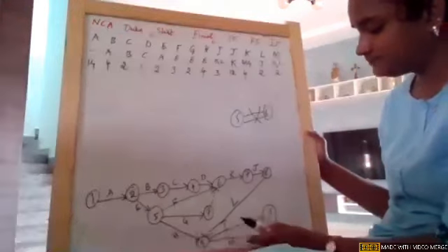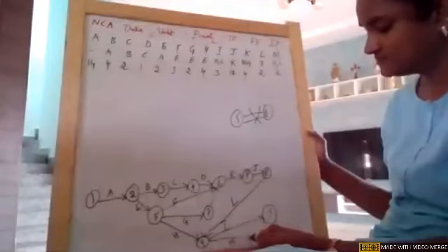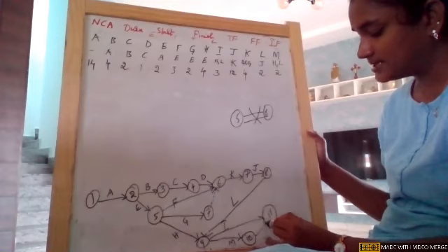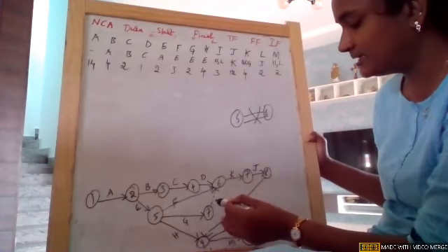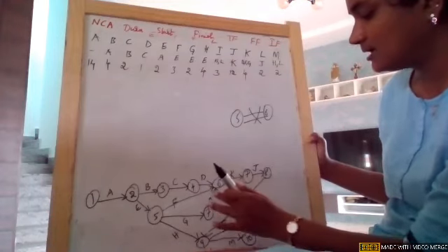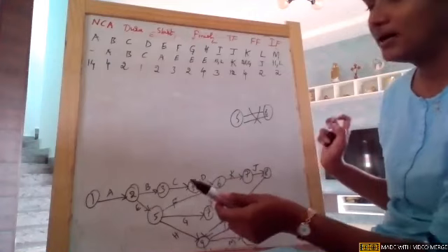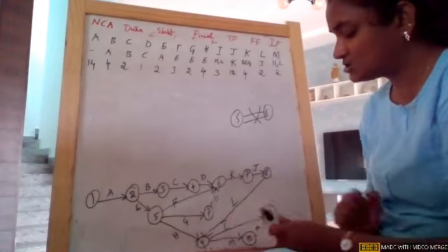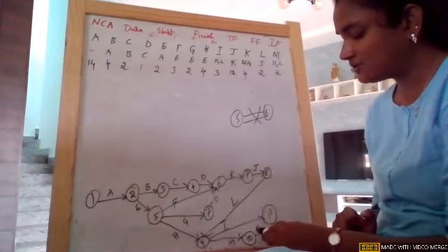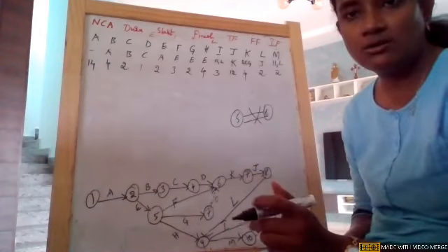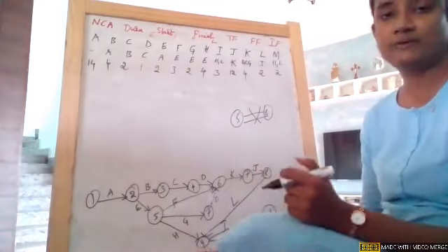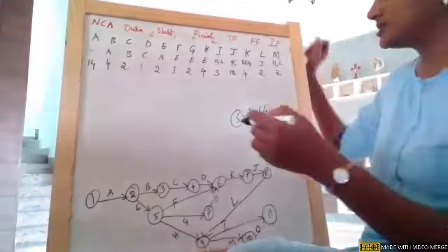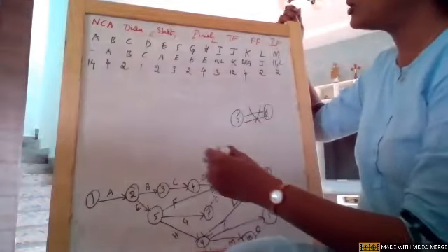I'll name it as 10. So from here, M can be acting as a dummy. This dummy is M, and this dummy is G. Okay, girls. But always, the duration of a dummy is always 0. Remember that. If I write a letter there, again I need to include the durations there. So see the network, I just put it on my board.